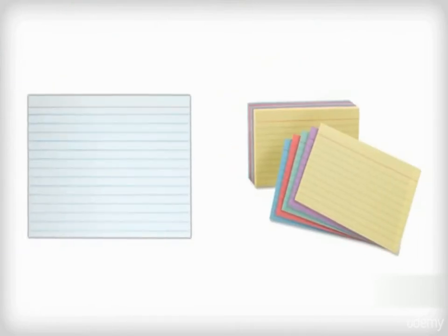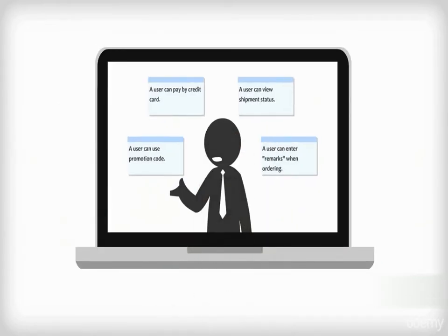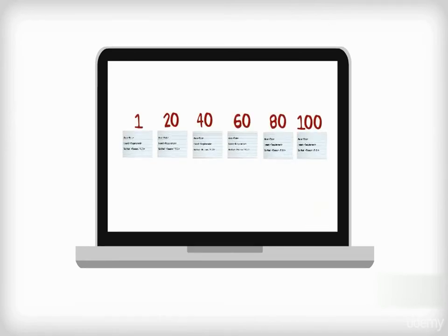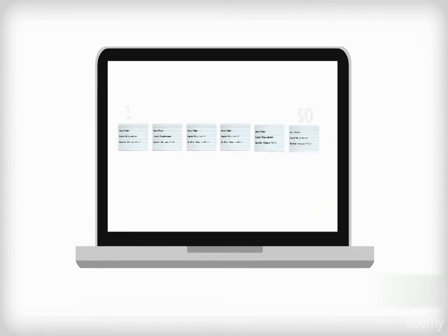With paper story cards, ordering the stack is, of course, enough to show priority. However, there are a number of software tools that allow us to create virtual stories. With software story cards, I recommend using drag and drop, or if that is unavailable, a relative scale. Usually 1 to 50 is enough, but even 1 to 100 works for huge backlogs.